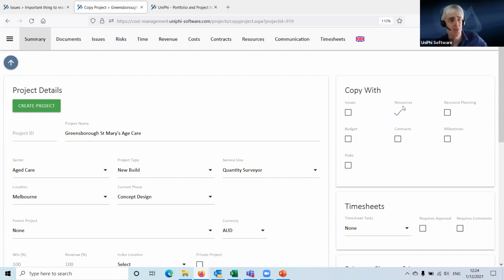Or it could be a massively complex thing where it's faster for you to go through and amend things rather than create them from scratch. So that's project templates. Fantastic where projects are essentially being called off to you, or common things being repeated, and you would use that template. So you might stick them in a project type of template.